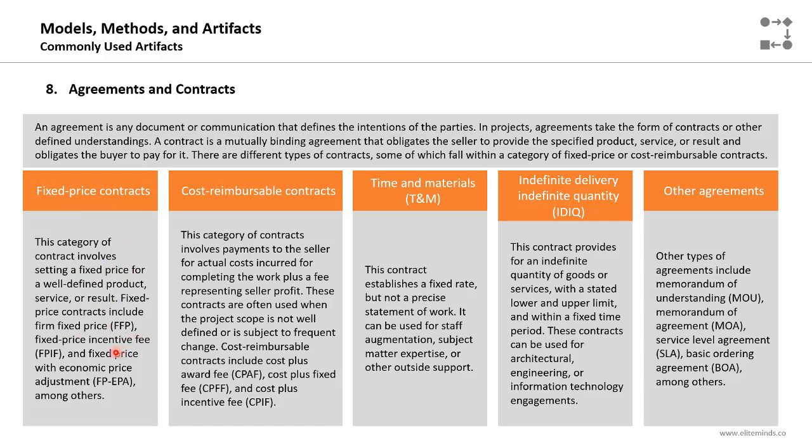Sometimes the buyer will provide the seller with an incentive fee based on their performance. So this is a fixed price incentive fee. And sometimes for projects that will span over years and we are expecting prices to change, we can use a fixed price with economic price adjusted.